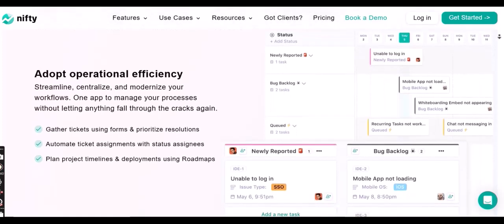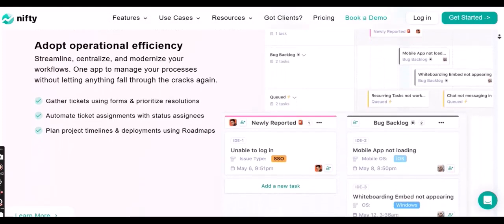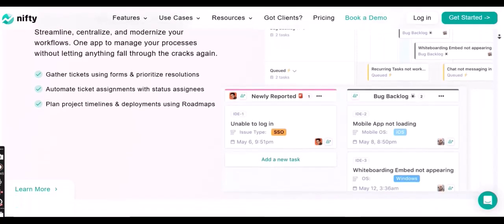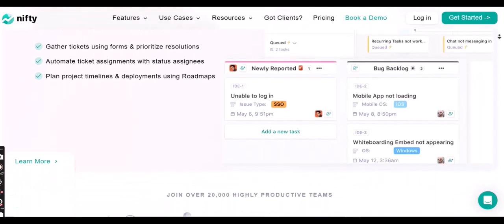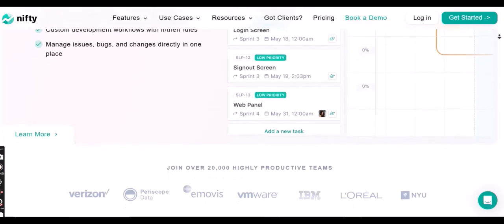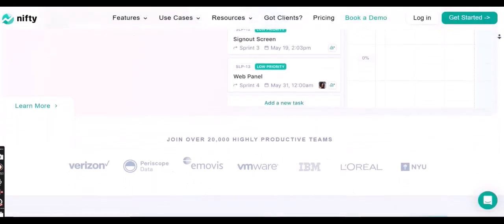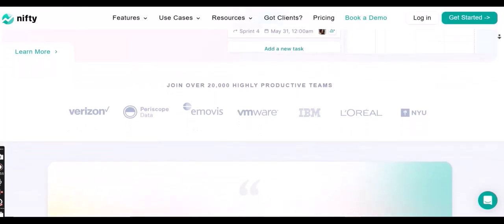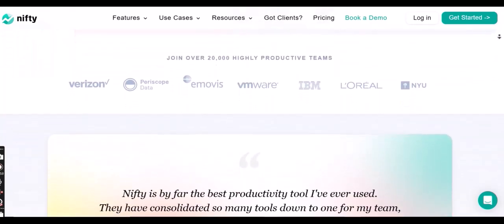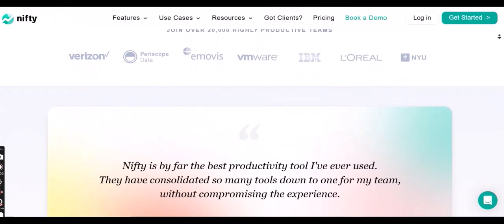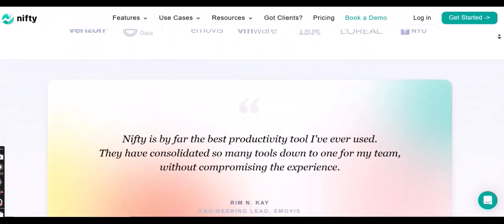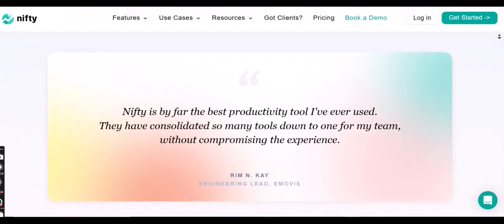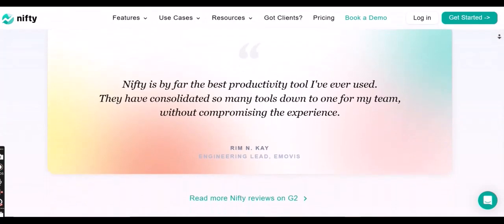4. Resource allocation and management. Effective project planning involves not only scheduling tasks but also allocating the necessary resources. Nifty allows you to assign team members to specific tasks and track their workload. Assigning team members. When creating or editing a task, you can easily assign it to one or more team members. This ensures clear accountability and allows team members to see their assigned responsibilities.